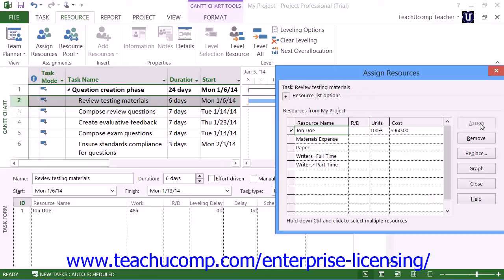Once you click the Assign button, you will then see the units and cost for the task assignment shown for the selected resources in the Assign Resources dialog box. You may also see an R&D column if you're using Microsoft Project Professional. This column is related to setting a priority for resource assignments when using Microsoft Project Server with the Resource Substitution column.